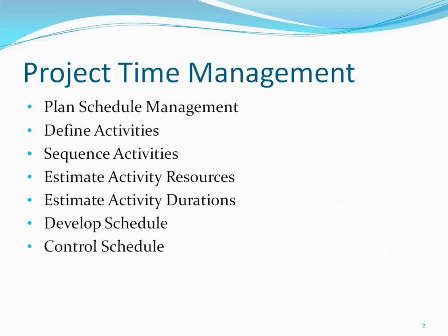If you want to know that, first you have to define the activities. When I say define activities, you remember that in scope management, we have divided the work, decomposed the work into a level called work package. So this particular work package will be further divided now to an activity level.